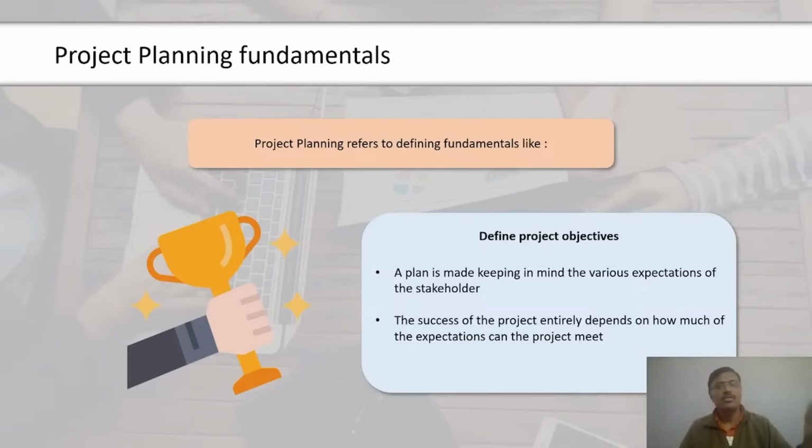In the next screen, let's learn about earned value management and its related terms. Earned value technique is an excellent way to track the project progress against the project plan. It is a method of measuring the project performance objectively and comparing it against the project baseline. Results from an earned value analysis indicate deviation of project cost and schedule baselines. Baseline is the initial approved value along with approved changes. Therefore, schedule baseline is the first approved project schedule along with approved changes.